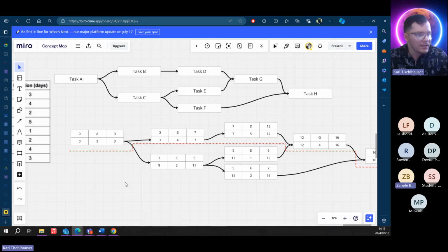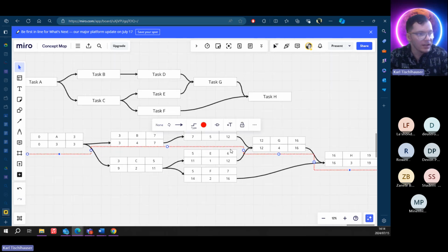Okay, so this is lesson 4. It's all about scheduling tools, and we push learners to do a critical path analysis. This is critical path analysis. You can see that we have our critical path right here. This line is our critical path that the project must follow. If any of these blocks on the top, these are activities, get moved around, it negatively affects the finish date of the project. But the ones below the line, you can move them around. You have a lot more flexibility.